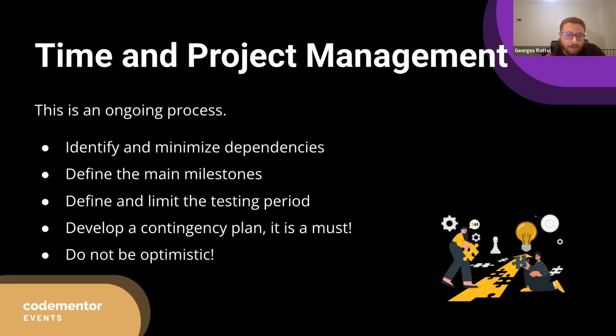And this is very, very important to be defined, and for the client and developer to be aligned on, and not to leave testing till the end of this period. It's important to start testing as soon as possible, even if it's testing small components, because the sooner the developers get feedback, the faster they can solve it, integrate it in the milestone itself, and release faster.